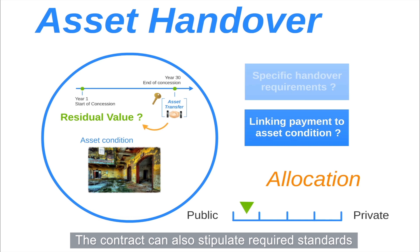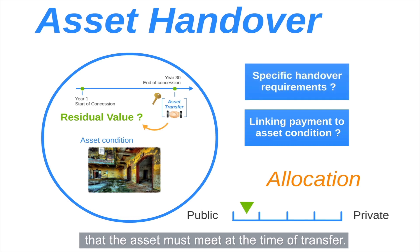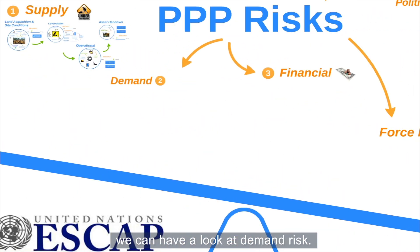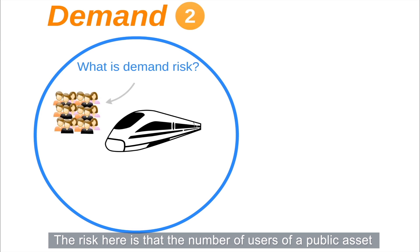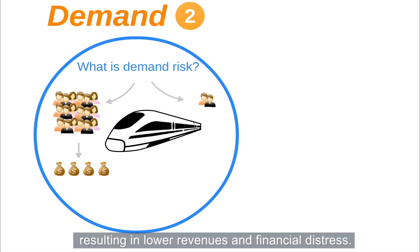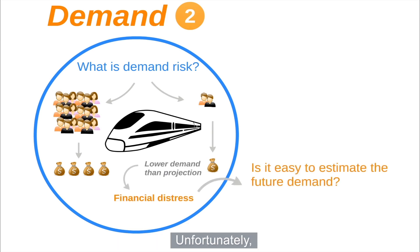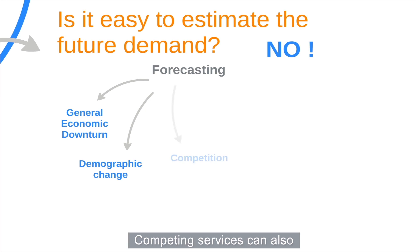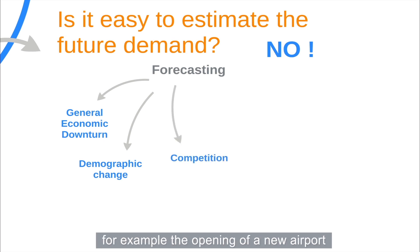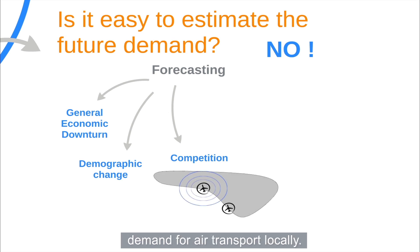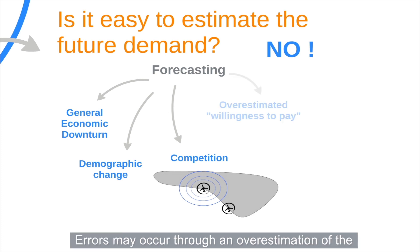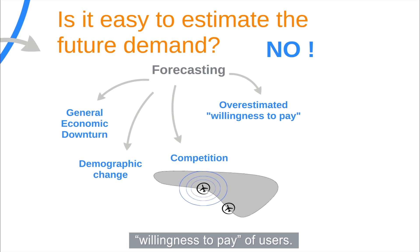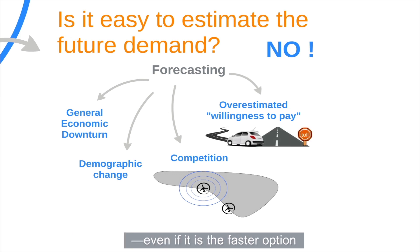Now that we have covered supply-side risk, we can look at demand risk. The risk here is that the number of users of a public asset may be lower than anticipated, resulting in lower revenues and financial distress. Unfortunately, forecasting demand over a long period can be particularly difficult. A number of factors can influence demand for public services, such as economic and demographic trends. Competing services can also reduce anticipated demand — for example, the opening of a new airport in a nearby region might impact demand for air transport locally. Errors may also occur through overestimation of users' willingness to pay; some users may decide not to use a toll highway, even if it is faster, simply because they view the cost as unjustified by the time saved.